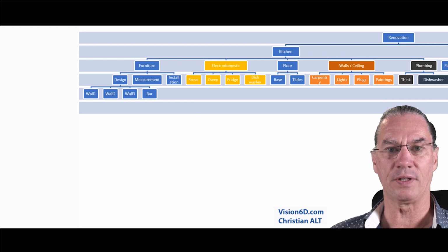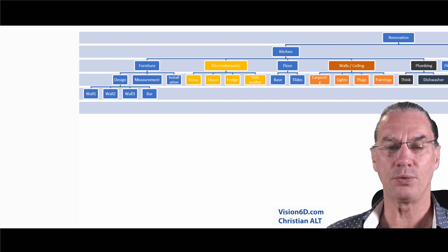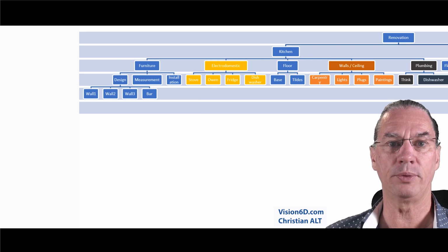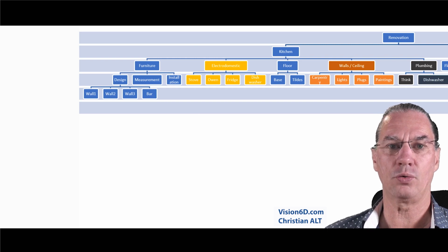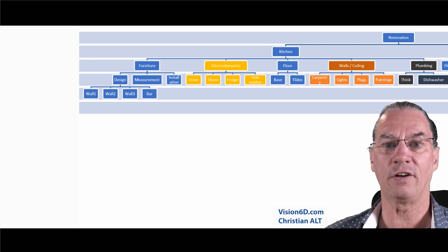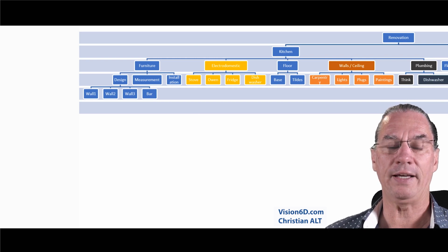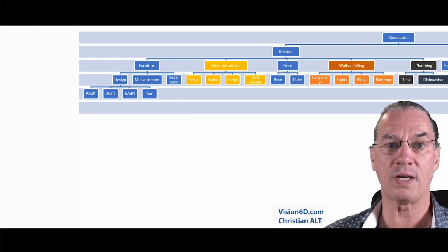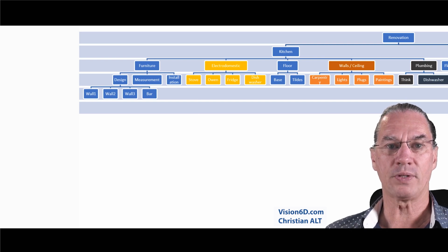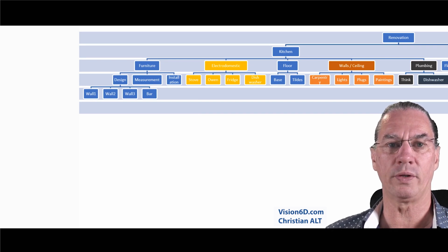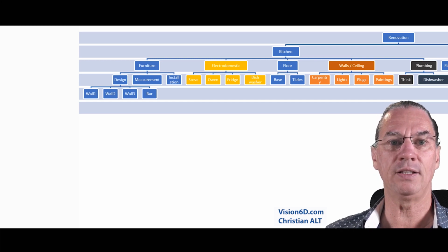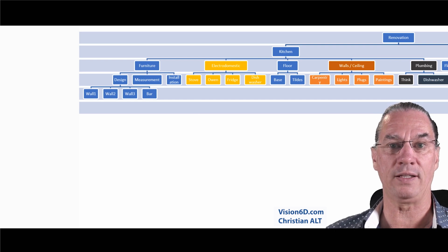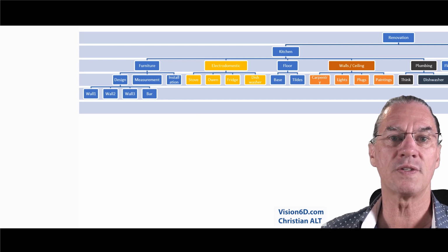Another point that is interesting is the wall and the ceiling. As you see, the walls, there was carpentry to be done, and then of course there were paintings, and then came the electrician with what kind of lights and what kind of plugs. So this, I didn't decompose it further, but when we discussed, I was a bit surprised, because there was the choice of color, the choice of shape. Do you want them square? Do you want them round? Do you want them white? Do you want them gray? So all this I didn't decompose, and it was a bit of a surprise, and it was at that time that I quickly had to decide.